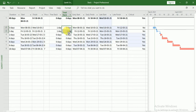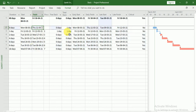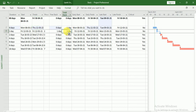Now I have only two more days so that I can delay my task. Suppose if I delay this task by one day, this should be finished on the late finish. We can finish it till 12th of March. If we go beyond 12th of March, then my project finish date will be changed — my complete project will be delayed. So this task I can finish till 12th of March. But suppose if I delay by one day, then I still have one day relaxation — either I can delay this task by one day or I can delay that task by one day.